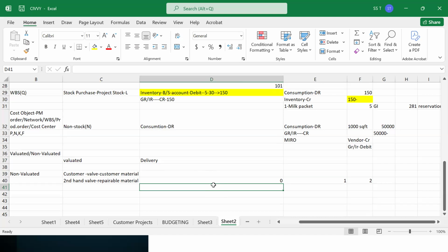And there are scenarios such as cost plus margin projects. You have heard about cost plus margin: the contract is in such a way that whatever cost is incurred, I will pay for you. On top of it, you may ask me what is the benefit for me? I will give 5% or 10% margin on top of the cost. That is a cost plus margin project.